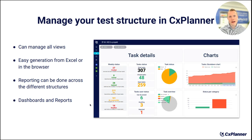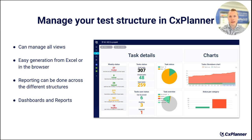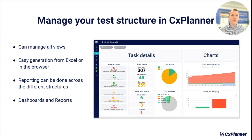My final advice is to manage your test structure in CX Planner. In CX Planner, you can manage all these views and decide whether to divide by area or by system — we support everything. There is easy generation from Excel spreadsheets: work in Excel, import them, and we will generate the lists and overview for you. You can also easily manage and edit it from within the browser. We also have a reporting feature that can report status across all these different views, so whether you choose by area or by system, you can always deliver the specific reporting the client is requesting.